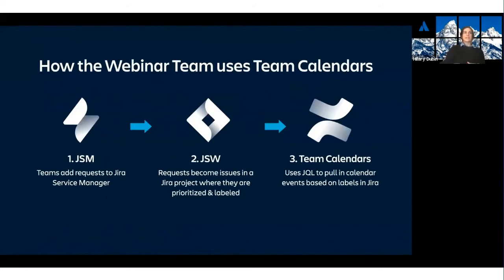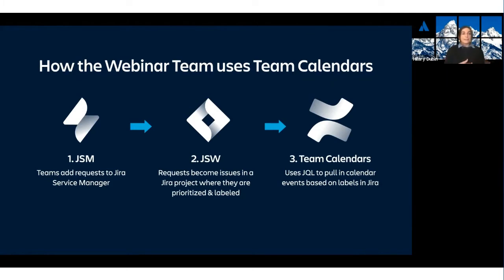By linking Jira Service Manager, Jira Software, and Confluence Team Calendars, the webinar team is able to create a seamless process to manage requests and plan their schedule accordingly. First, internal teams can add requests into Jira Service Manager. Then, those requests become issues in a Jira project where they're prioritized and labeled. Finally, those issues get automatically transferred into calendar events based on their labels.